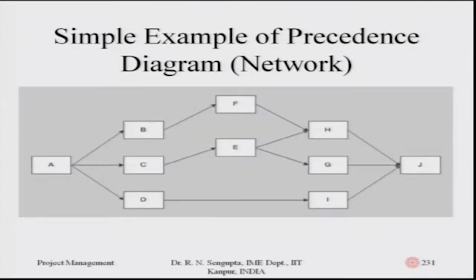After A you have B, C, D jobs and activities; after B you have F; after C you have E; after D you have I. So if the sequence of activities shown in slide 230 is converted into the activity precedence diagram, it has basically A being followed by B, C, D in some sequence. Then F and E lead to H, E leads to G, and D leads to I. Once H, G and I are completed it will go to the end job J which completes the work.